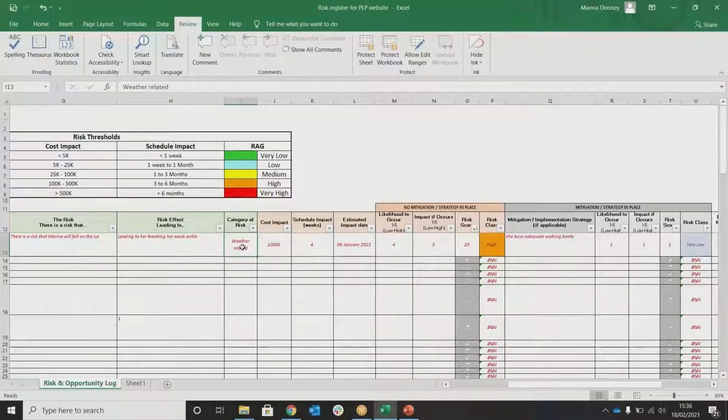So they need to be on there to be on top of what amount's getting put there. Because in the bigger picture, you have a risk pot. You have a certain amount of money for your risk. And if you have a risk register and all your risks would hit and they'd all have an impact, and that amount equates to more than the money you have in the pot, then you have a problem. Gotcha. Okay. That makes sense.